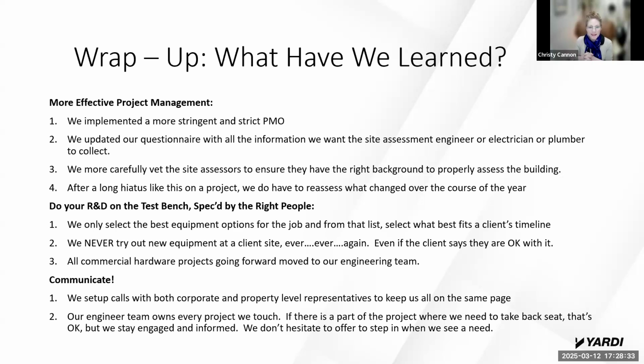We manage our client's scope. So in the project charter, the client has to note when the scope changes. We'll have multiple versions of that project charter. And you do your R&D on the test bench. You don't do it at the client site, as I mentioned, but also you have the project spec'd and managed by the team with the expertise that best fits that project. So a team that usually does multifamily water meters should not be speccing commercial electric and gas.